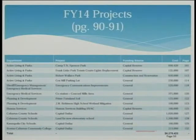So with Camp Tia and Spencer Park, of course, that's a project to replace Helms Hall, but we will probably be replacing more than one building out there at a time. We have been working with the Boys and Girls Club and have an architect that you've already approved for that project. It is very complicated because of the waste disposal system and siting. And then in addition, of course, we have an agreement for our own programs to have programs during the summer, the very popular use of the pool, as well as Boys and Girls Club programs during the summer. So as we move through the design, we'll need to keep in mind that we want to operate those programs for the summer, and construction and demolition being so disruptive, we'll need to keep that in mind as we look at the schedule.